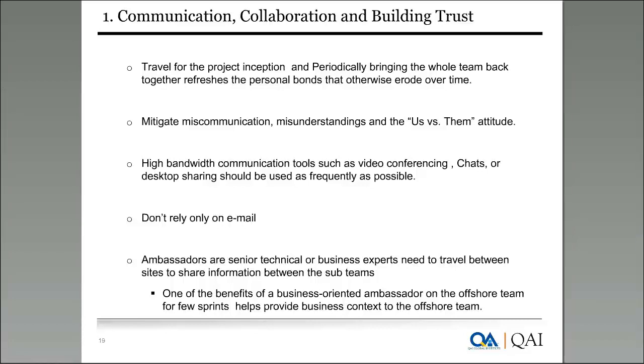Okay, so we need to mitigate the miscommunication and misunderstanding, as I was telling. In very key important projects, it may be a good idea for the whole team from one location to travel to the other location, spend time there at least during the start of the project, some two to three sprints, and then come back and start the work from their own site. That is another practice that we have seen in a lot of organizations.